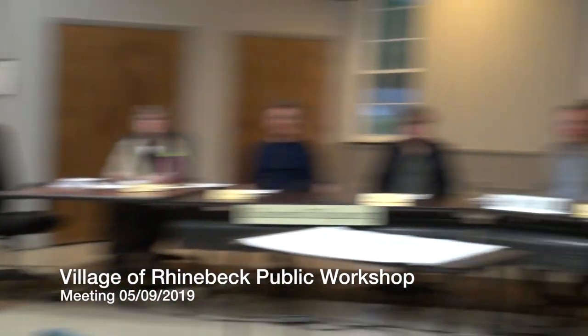A good contractor can potentially get two or three services a day. We're talking around 130 customers total, a good majority of which are going to be connected. So you're not talking a lot of people that have to actually do the replacement all the way into the home, maybe 20 or 30, hopefully less.